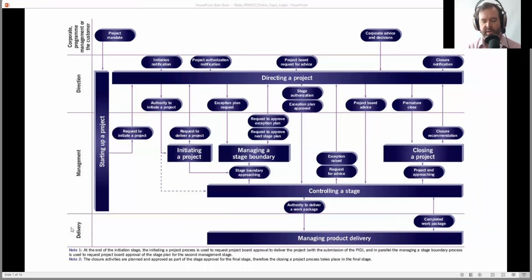Change control is about saying, well, we're meant to build this, this, and this, and now we need to change that because various things, now we've got to build something different. So change control is about how do we go about making sure that that's managed in a careful way, because that's going to affect lots. It could affect our risks, our budget, our timeline, our scope. It could affect our quality management because we're now changing the scope of work. We're changing what we're doing. So that kind of control is what we're talking about as a change. We're not talking about change management of saying, well, how do we get the people and the organization to change its culture and its process and its mindset about doing something? That is a different part of change.